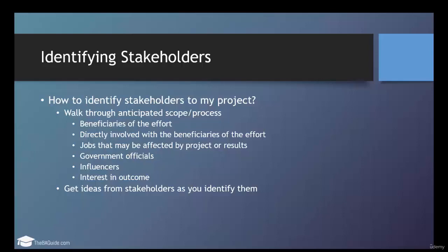Those stakeholders, they're more engaged in what they do, and they know with the people and the groups that they work with who is going to be affected by the project. And by doing that, you're able to uncover areas, people, groups where you normally wouldn't even have gone and asked any questions, gotten any requirements from them, because you maybe didn't even know that they were going to be involved. And so by asking identified stakeholders who additional stakeholders are, you can uncover areas that you weren't even going to go to, and you have one of those uh-oh moments right at the end of a project.